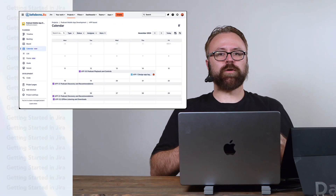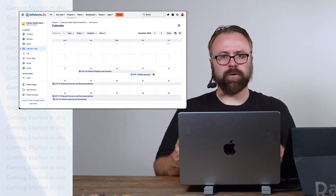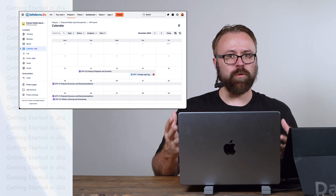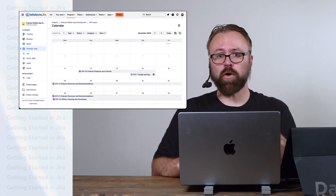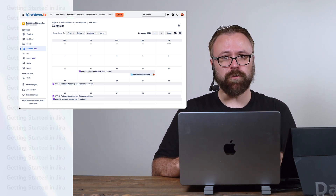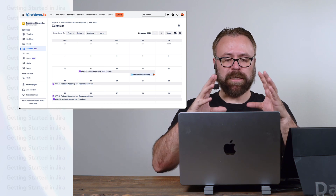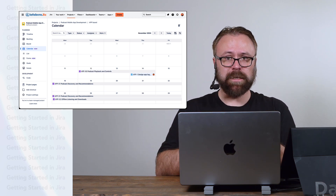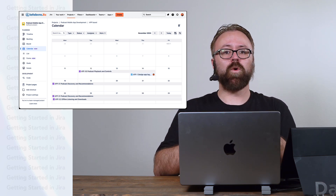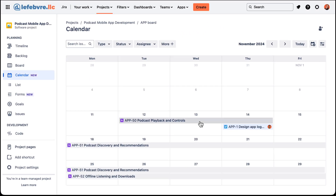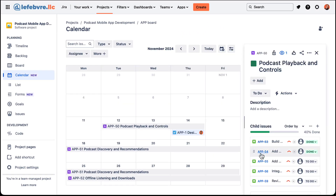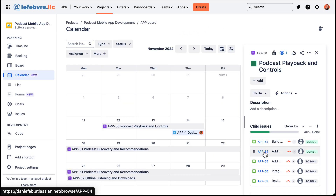The calendar view works a lot like any other calendar that you're already familiar with, but when it comes to Jira perhaps the most important thing to keep in mind about the calendar view is that the only issues we'll see in here are the ones that have dates associated with them.